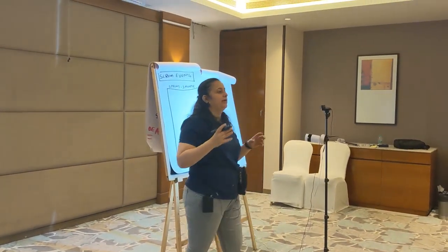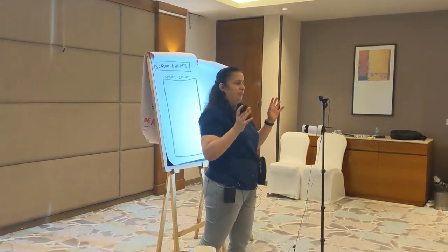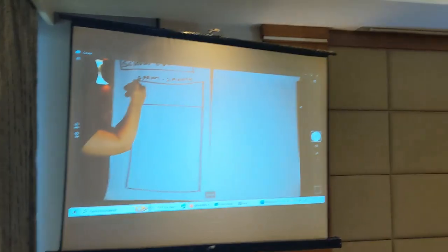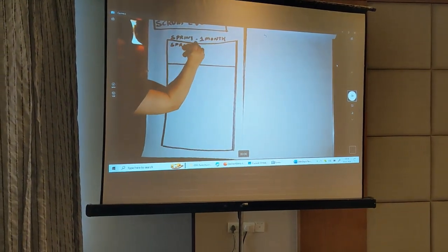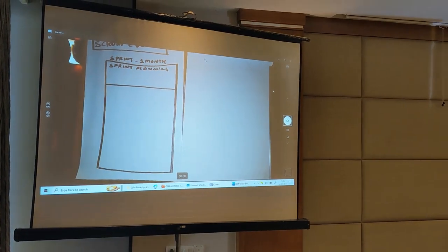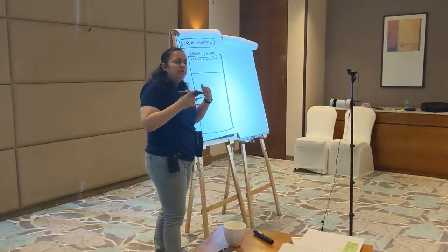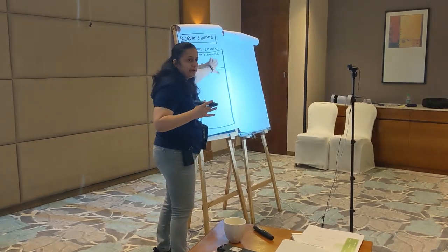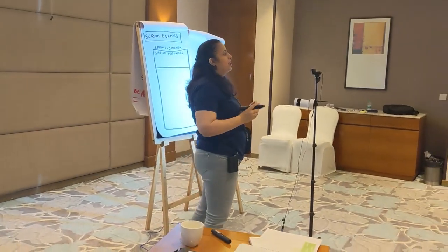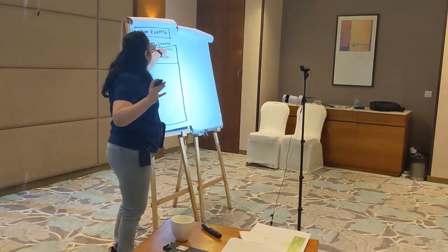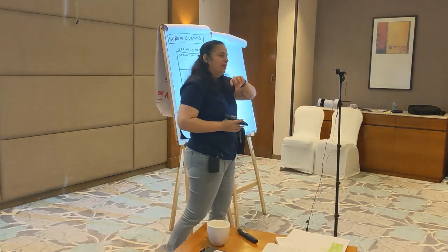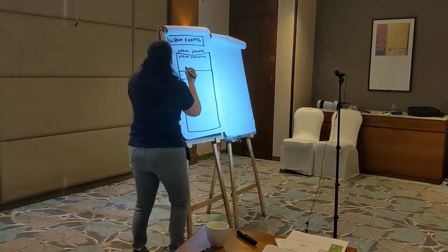So sprint planning is the first Scrum event of our sprint. So let me put it here. Sprint planning. The purpose of this Scrum event is to lay down work, decide what work we will do in this sprint, rest of the sprint duration. The maximum duration is 8 hours. 8 hours maximum when the sprint is 1 month. If our sprint is smaller, this Scrum event also will be smaller. So 8 hours max.